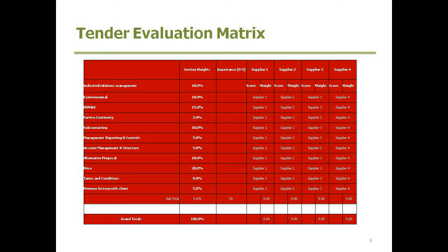It's got a lot of coordination with the general public as a result of a rebuild at a certain place, and so there's other elements that you want to tease out from the evaluation and get out from the contractor that they've got experience in this and they're actually good at it. So this evaluation matrix is a good way to look at that on one piece of paper and, or on the screen, and be clear in your own mind that you've made the right decision, that this is the best value contractor for the project.